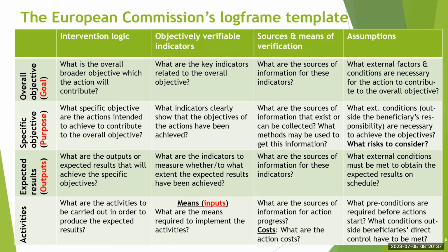And in the last column, this is where you must indicate any assumptions that must exist, or any conditions that must exist, or what potential external factors could undermine the relationship between your activities and expected results, or between the results and the specific objectives, and so on and so forth. With this general overview, I would want to straight away